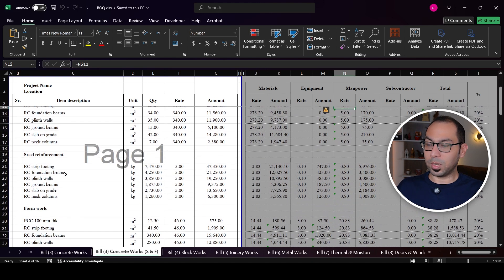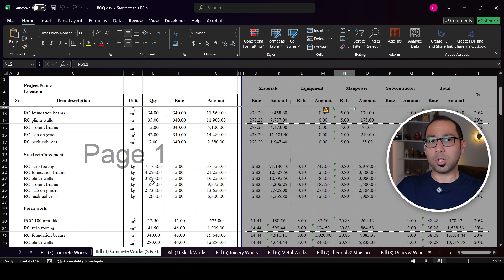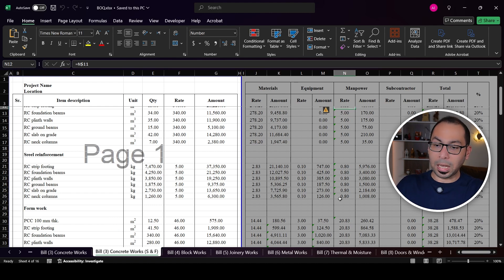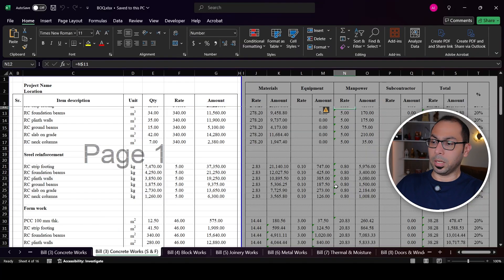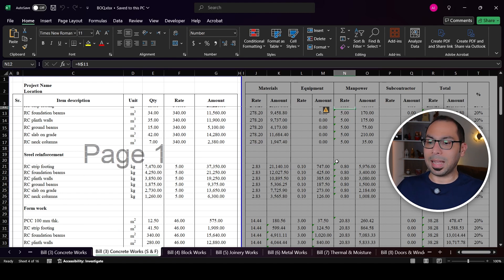For steel reinforcement, the steel is measured in kilograms, so I just need to find out how many tons or kilograms of steel to supply and what the supply rate is — because steel is purchased in kilograms or tons. Then for the steel fixers, you can get the cost per kilogram by calculating how many kilograms each steel fixer can install per day. Both supply and installation are in kilograms, making it very straightforward to estimate.